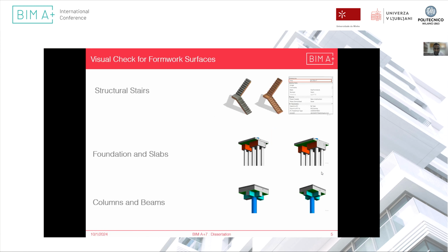These are some images which show how the formwork quantification was impacted. If you see this image over here, you can see the formwork layer is going underneath the whole slab. It is not taking into consideration the joining of this beam, but with the tool developed, these joint conditions were taken into consideration, and the precise calculation of formwork was done.